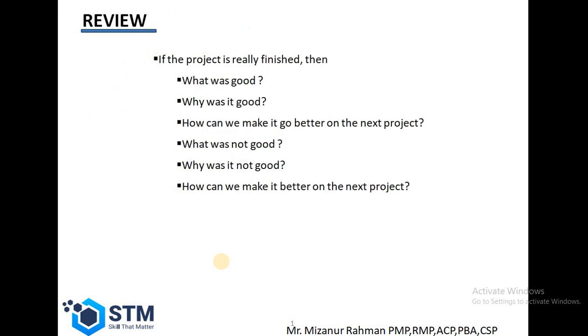Then at last we have to conduct the review of the project. Basically we have to find out what was good and what was bad during the project. First we have to ask all the project members what was good in the project, why it was good, and how we can make it even better on the next project.